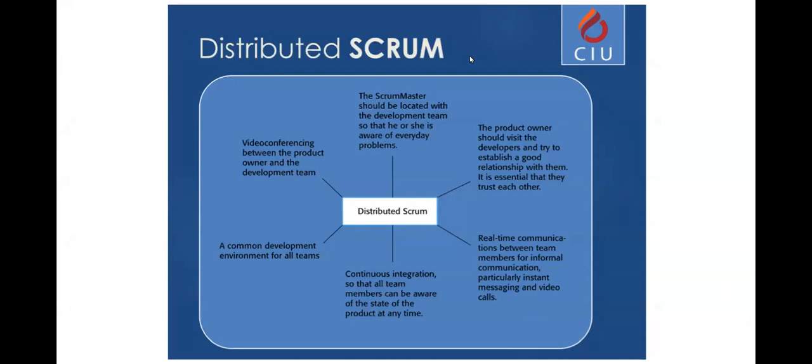Another idea behind distributed Scrum was to apply this to bigger projects, so that bigger projects can also follow agile methodologies. What they do here is that the parts of the project are divided into more than one sprint cycle. So instead of doing one sprint, you do many sprints, but they are all synchronous. Such as a specific team in England works on the user interface.